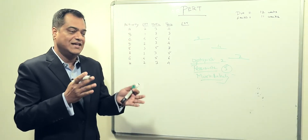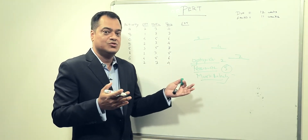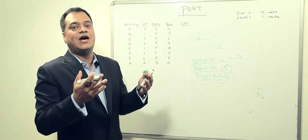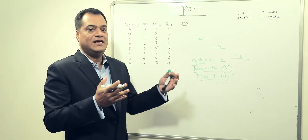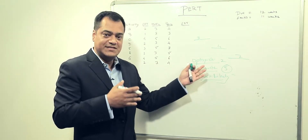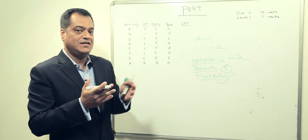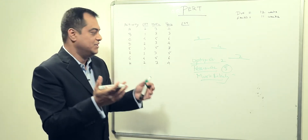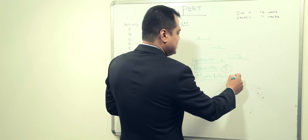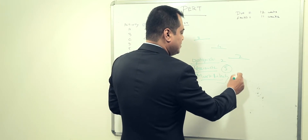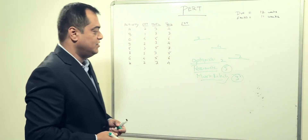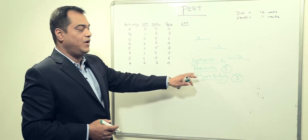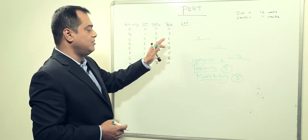Most likely is something in between optimistic and pessimistic — kind of an average between the two. It represents what is most likely going to happen. In this example, the most likely number is three.